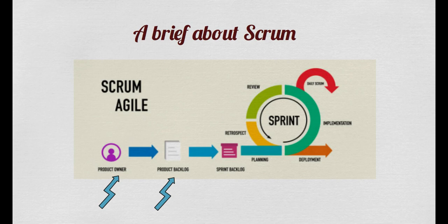All the features that are prioritized are in a ready state with all the requirements and details discussed and gathered during a sprint grooming ceremony. A group of features are then selected and made available in the sprint backlog, basically representing that the team will implement these features during the current sprint.